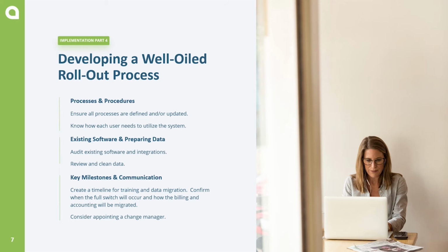Thoroughly reviewing your data and making plans for any cleanup should be started at the beginning of the project so that any issues can be addressed, decisions can be made, and timelines can be adjusted if necessary. It can also help structure some of the configuration and design options for your system, as while you are reviewing and preparing your data, you are bringing it all together and learning how it will become one system.